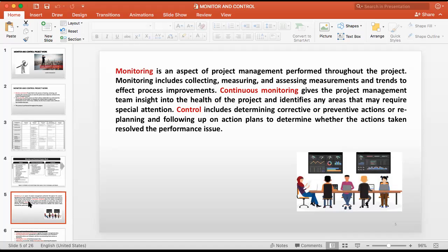Some projects do daily meetings, or otherwise, the project manager can have fortnightly meetings. That is what I did, fortnightly meetings. And area managers, site managers, and section managers can have daily meetings. All these come to the fortnightly meeting to take the decisions.